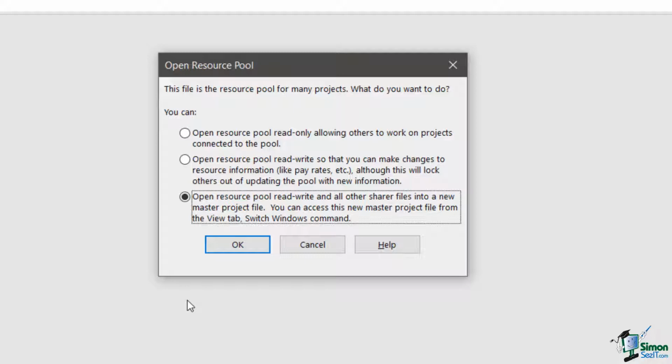This all is, if you like, the framework that contains the 4 sub-projects. And I've really done that on the basis that this would be something that would continue throughout the life of the overall project. But in some cases, either you don't need that, or in fact that creates its own problems, such as the fact that it restricts how many users manage their projects. And it may actually be better for the users to keep their projects completely separate on a day-to-day basis.